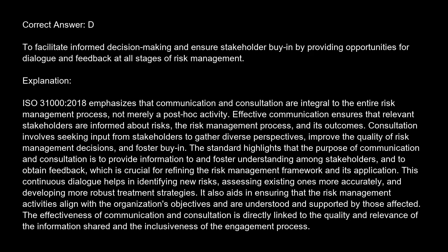The correct answer is D. To facilitate informed decision-making and ensure stakeholder buy-in by providing opportunities for dialogue and feedback at all stages of risk management. Explanation. ISO 31000-2018 emphasizes that communication and consultation are integral to the entire risk management process, not merely a post hoc activity. Effective communication ensures that relevant stakeholders are informed about risks, the risk management process, and its outcomes. Consultation involves seeking input from stakeholders to gather diverse perspectives, improve the quality of risk management decisions, and foster buy-in.